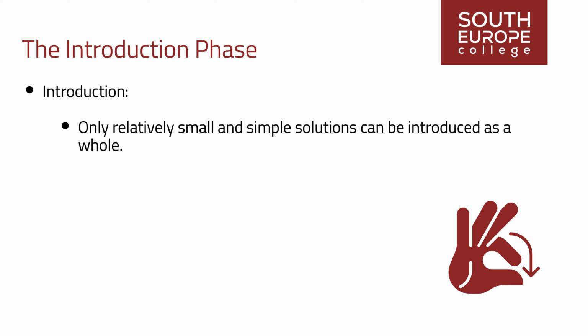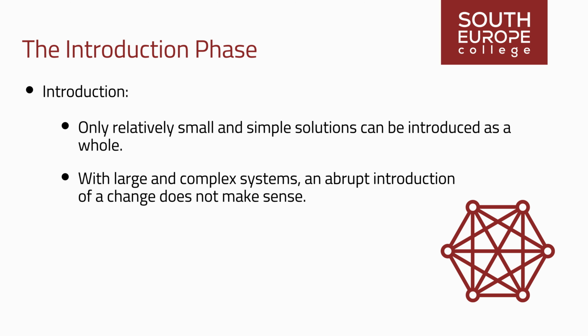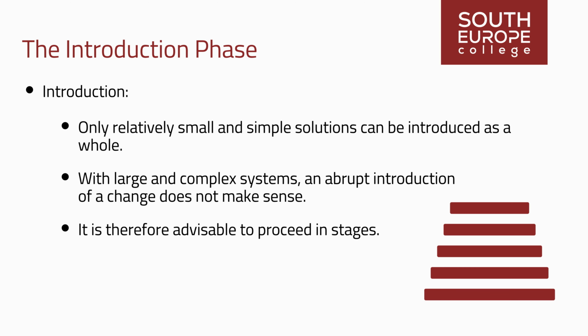Introduction. Only relatively small and simple solutions can be introduced as a whole without taking a great risk by keeping them in one piece. With large and complex systems, an abrupt introduction of a change does not make sense because of the large number of incalculable side effects and dependencies. It is therefore advisable to proceed in stages. With the overall concept in sight, further steps are taken based on the first experiences made with the introduction.